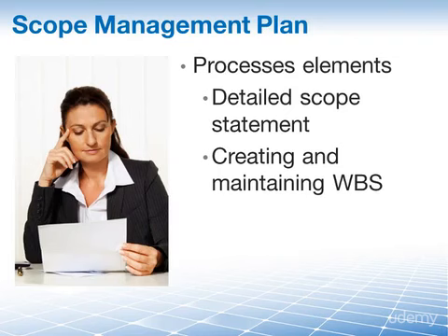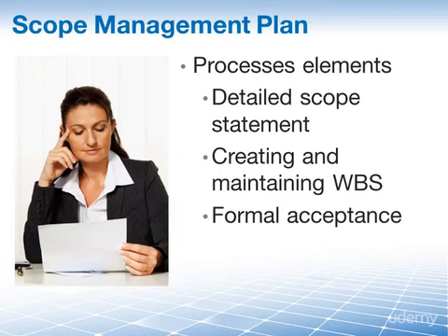We also specify the process of how you will gain formal acceptance of the project deliverables, and we determine how change requests to the detailed project scope statement will be handled through the Perform Integrated Change Control process. Again, the scope management plan defines a process for change control.